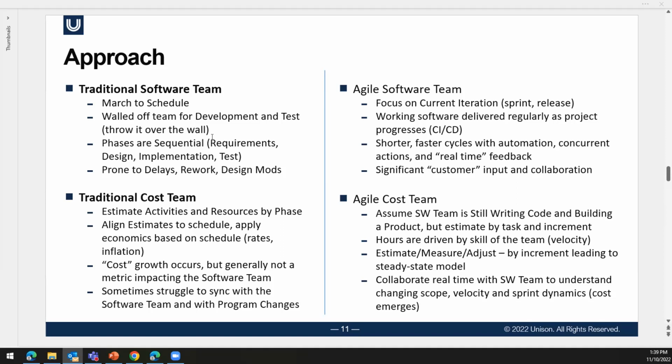It's a good question. Now, what we've done is we have a variable way to set up the model. So you say, okay, this team. So instead of describing a piece of code that's going to be done, we first describe a team that's going to do some work, and then we assign them a certain amount of capacity to perform in the next however many period of time. And of course, we've discovered all the things you've discovered. The only thing constant in Agile is constant change, but you try to hope that maybe they'll lead towards something predictable in aggregate over time, at least by team or maybe by application type or by something.